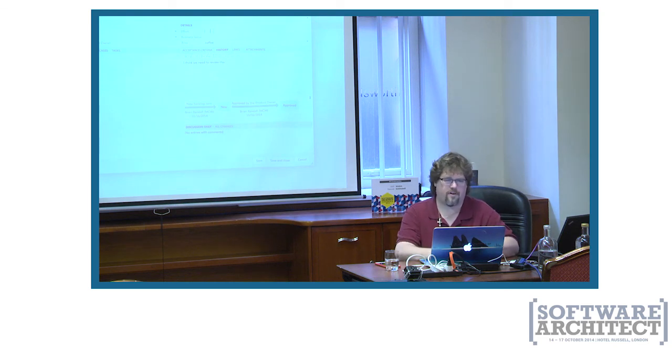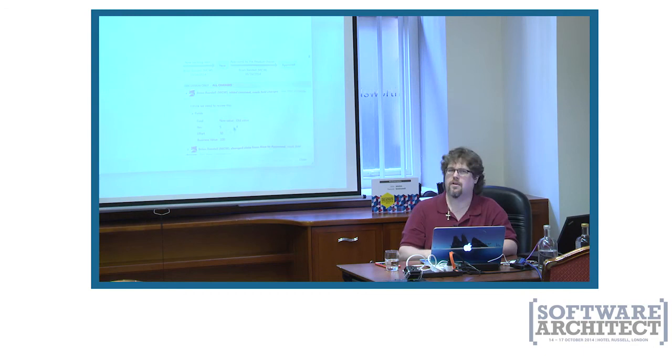And I can assign an effort in something like story points. So I can say this requires 50 story points. The business value is 100, very high. And so I'll save that, and what you'll see here is the discussion only. If I put a comment, it shows up with my picture. If I click all changes, I can see any discussion comments, but I can also see the fields that were changed. I can see the new and old value.